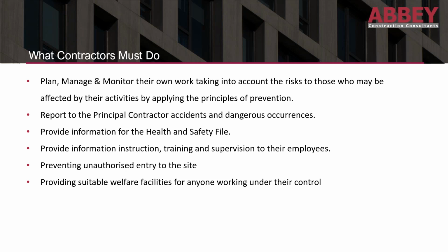Principles of prevention can be found in the CDM Regulations 2015 or in the Management Regulations. They must report to the principal contractor any accidents and dangerous occurrences. They must provide information for the health and safety files that can be collated and used for the use and maintenance of the building. They must provide information, instruction, training and supervision to their employees and demonstrate that they've done that. They must prevent any unauthorised entry into that works area or that site, and provide suitable welfare facilities for anyone working under their control.